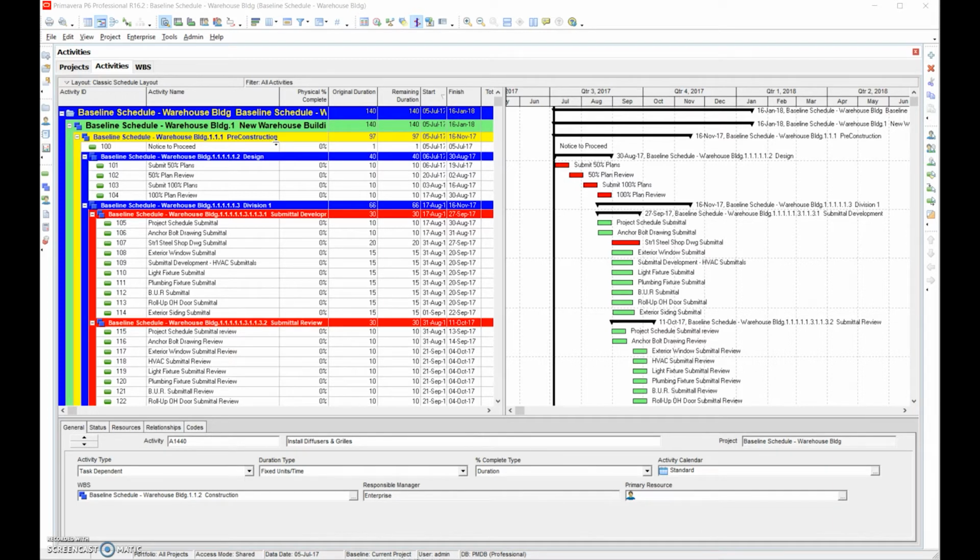And there's a lot of literature, and a lot of documented experts who say that the level of detail should be less than 20 days, and 2 to 12 is a good rule of thumb. So how do we break something down that is large? Say that we have a road that is 4 miles long. If we're going to do the paving for 4 miles, how do we break it down to where we're not having an activity which is 40 duration days?